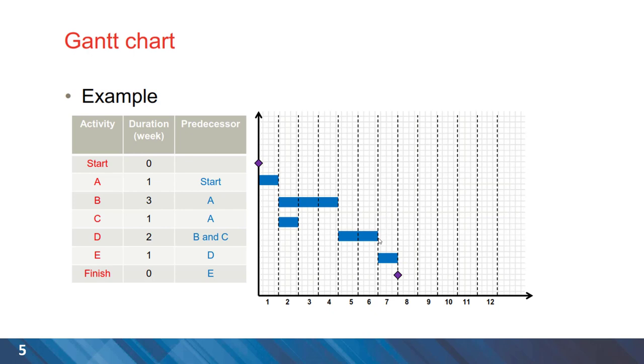Activity D is dependent to activity B and C. This means that activity D cannot be started until both activities B and C have been concluded at the end of the fourth day. And finally, activity E with duration of one day and the finish milestone for this project, which is at the end of day seven.